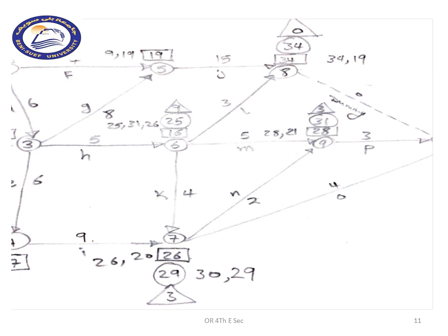If we choose 30, this will mean that I can delay starting activity N and activity O until we reach week 30, which will affect the whole network, which will affect the whole project.